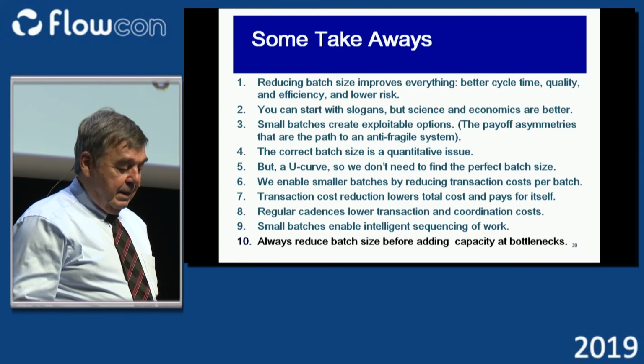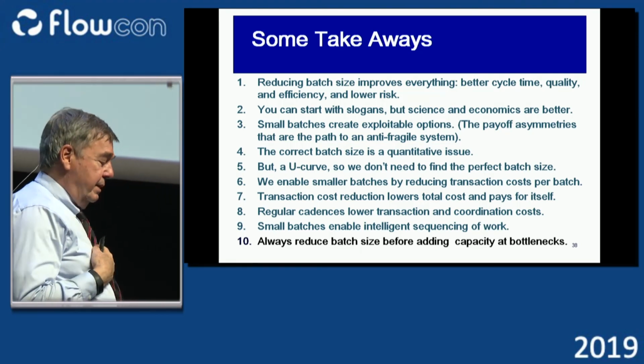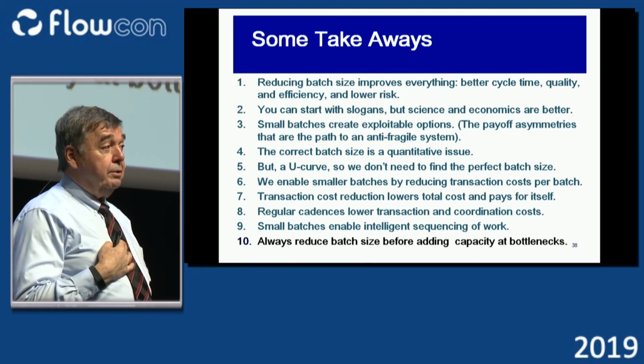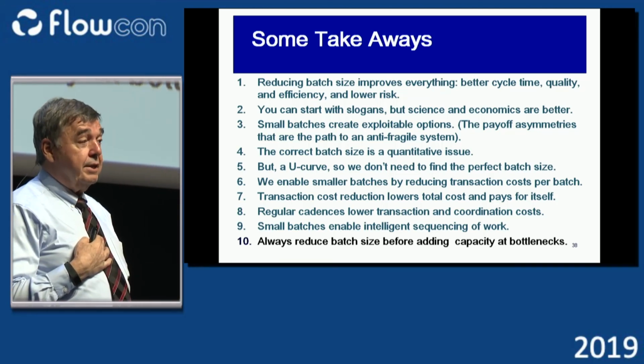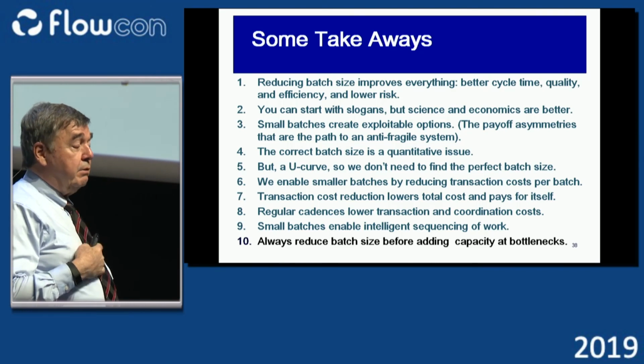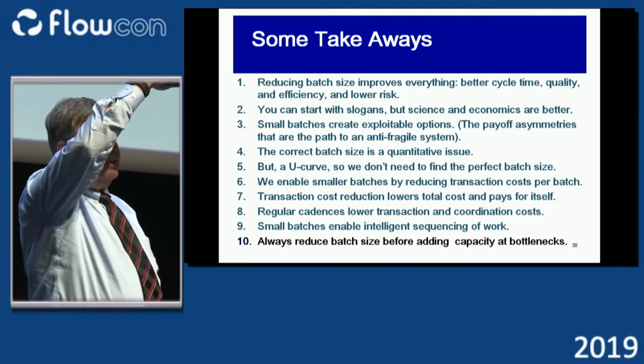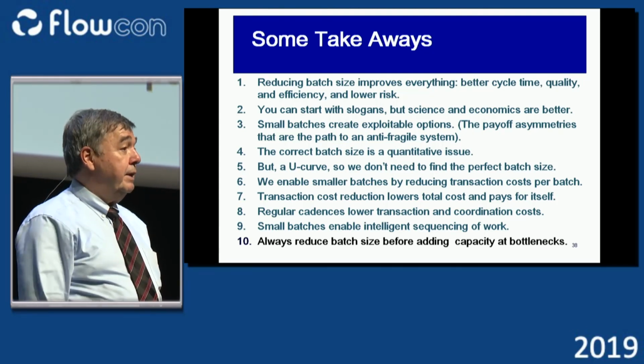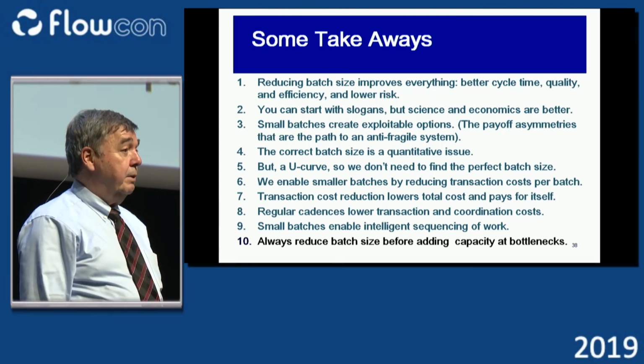And then the last thing I would mention, I didn't mention before, but I always do batch size before I do work on bottlenecks in a process, because batch size can create such a high variation in the workflow. Once you fix batch size, you may discover you don't have any queuing problems there at all.